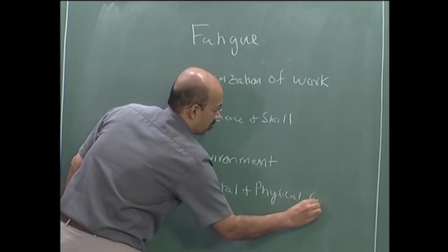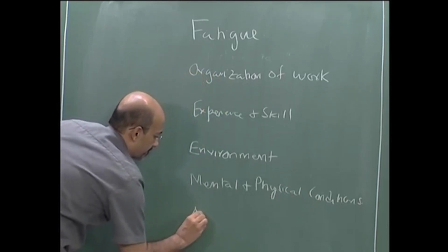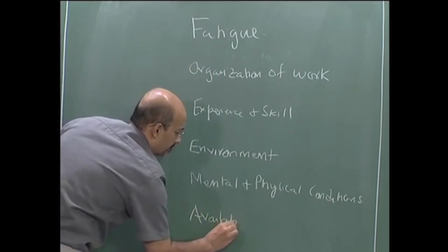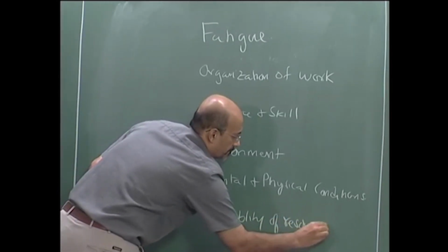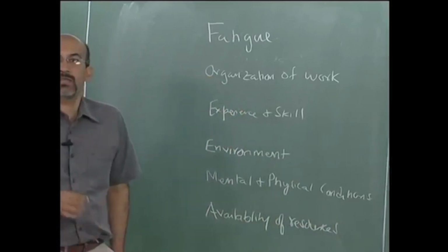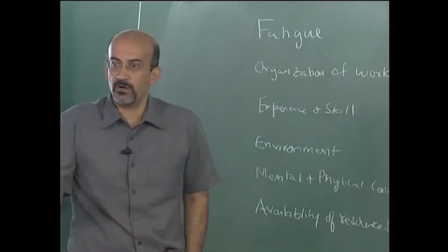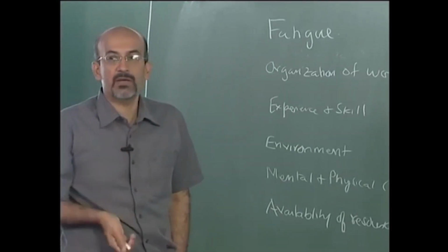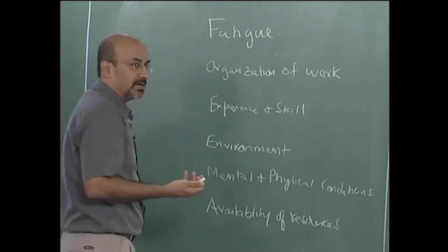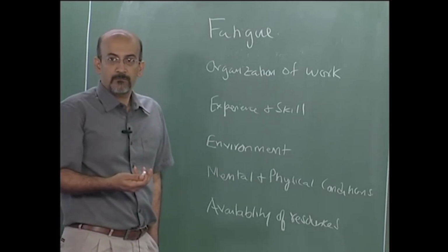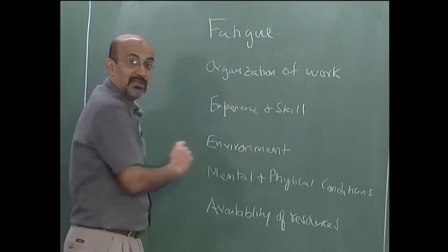Availability of resources. Yes, very important, because labor might be there, work phase might be there, but if the brick is not there, or mortar is not there, or something to level my wall is not there, whether it's a plumb or level or whatever, then again the worker is idle. Different parts of the day, like post lunch, before lunch. Yes, we can call it environmental factors, we can call it mental and physical condition.